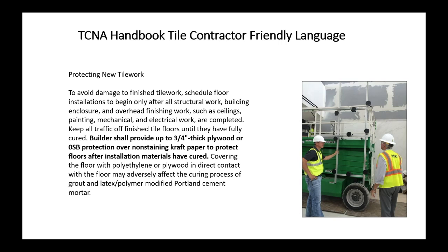But to keep all traffic off the finished floors until they have fully cured, the builder shall provide 3/4 inch thick plywood or OSB over non-staining craft paper. The reason for craft paper is because it still breathes. So if we had wet grout joints underneath there, for instance cement grout joints, the moisture could still get out. To protect the floors after the installation, after the materials have cured.